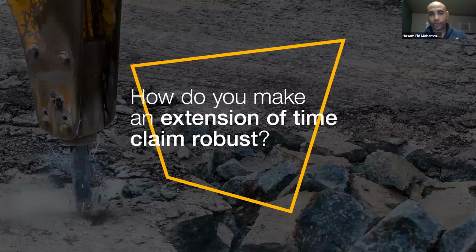we are those who are working the back end of the calculations. So looking at the analysis from the back end view, where the quantification process occurs. Quantification means that we are going to calculate the number of days and consequently the prolongation cost. The most common challenges that face the adequate quantification of extension of time, I mean getting a number of days, and consequently also the concurrency analysis, which is the most controversial part inside the extension of time itself, are those related to the schedule quality and the level of detail.